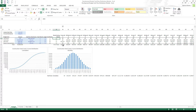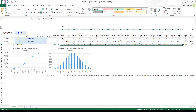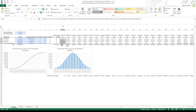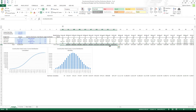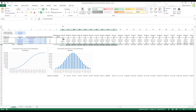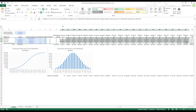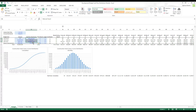To fix this, we also need to go to the S-curve tab and copy the formulas down there as well. You can do that for as many budget line items as you need. The sum line is the one you're most likely going to output to your development model as an outflow in your DCF, or use to forecast construction interest more accurately than simply straight-lining it.